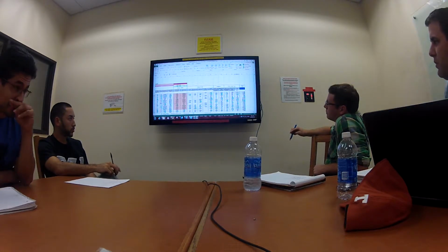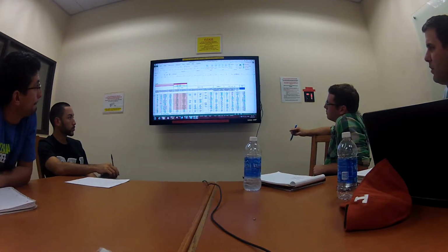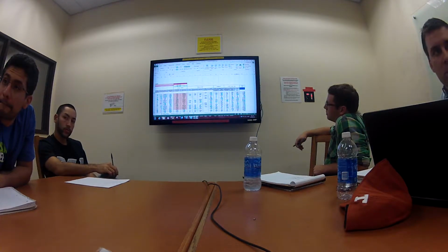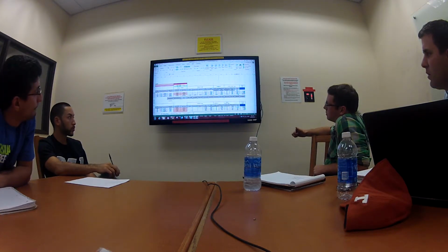Yeah, good. If you go up to the 35% up there, is that hard keyed in or is that a check? No, it's just in there. But you should be able to take that whole column, add it up, divide it by your total cost, and it'll be 35%. Supposedly.